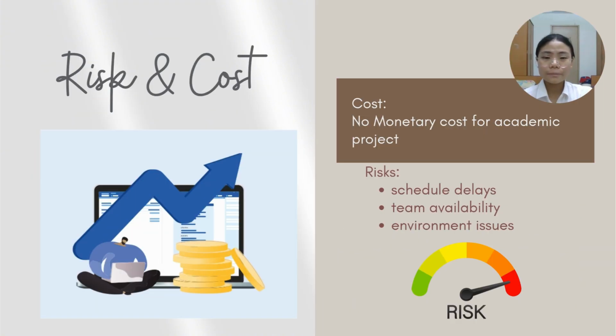Lastly, although this is an academic project with no actual financial expenditure, we applied real-world risk and cost management principles. To handle risks such as schedule delays, team availability, and environment issues, we built in buffer time, documented key processes, and maintained clear communication using Microsoft Teams. On the cost side, we use open-source tools and personal devices, while also considering future costs like hosting, security, and maintenance for real-world development.